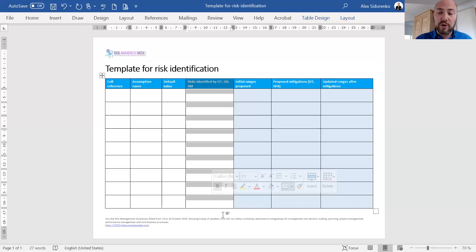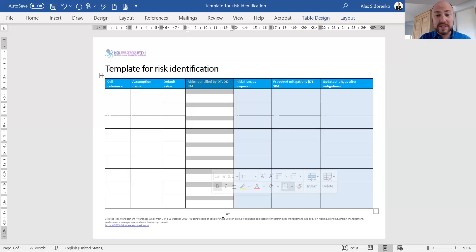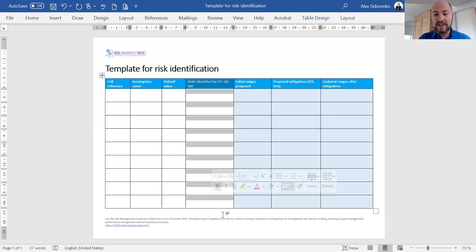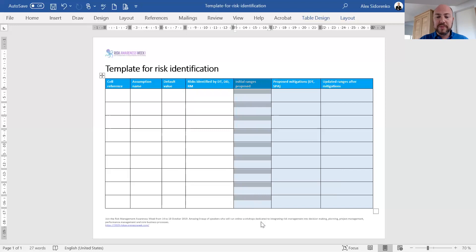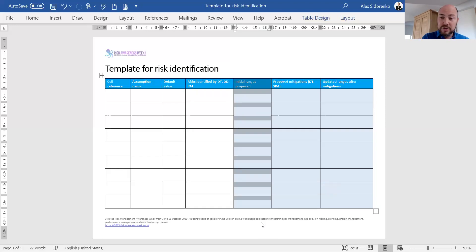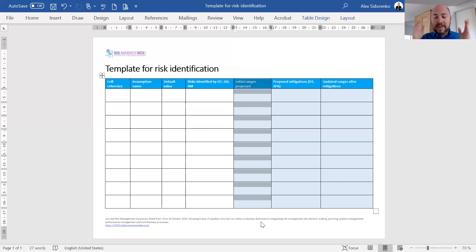Every single step we do, we're always trying to bring it back to the decision at hand, because that's the only reason to do risk analysis unless it's a regulatory requirement. The only reason to do risk analysis is to influence and to inform the decision at hand. That's why we would have a different risk analysis for every decision type. The fourth column is when we actually identify risks. Depending on how many risks we identified and how significant those risks are, we now have grounds to start replacing default values, which were usually single point estimates, with ranges. That's the whole idea of risk analysis.